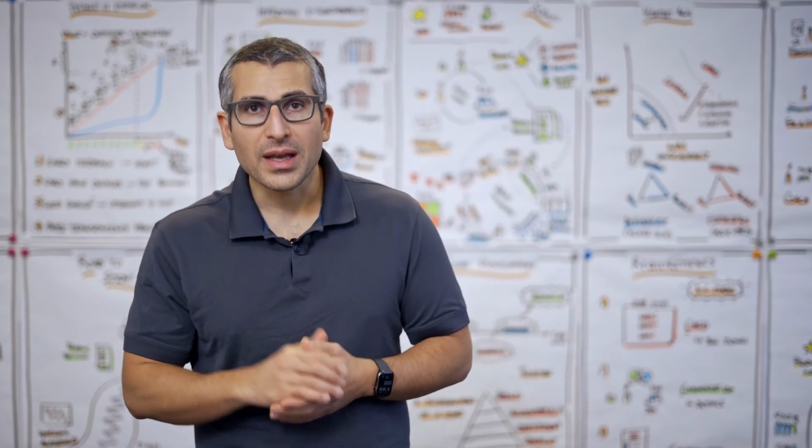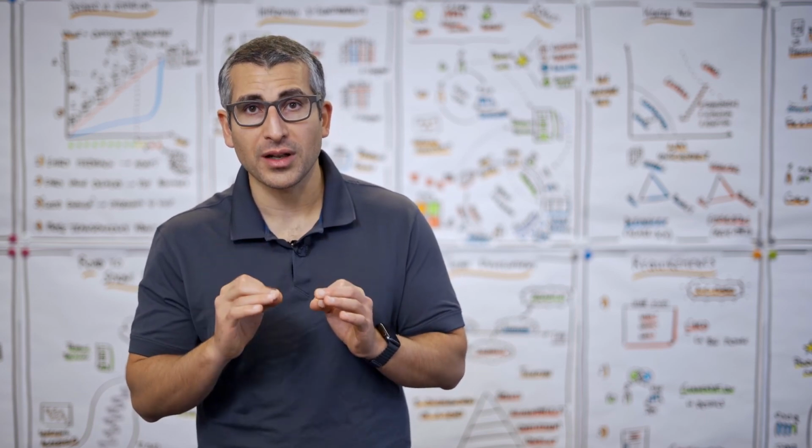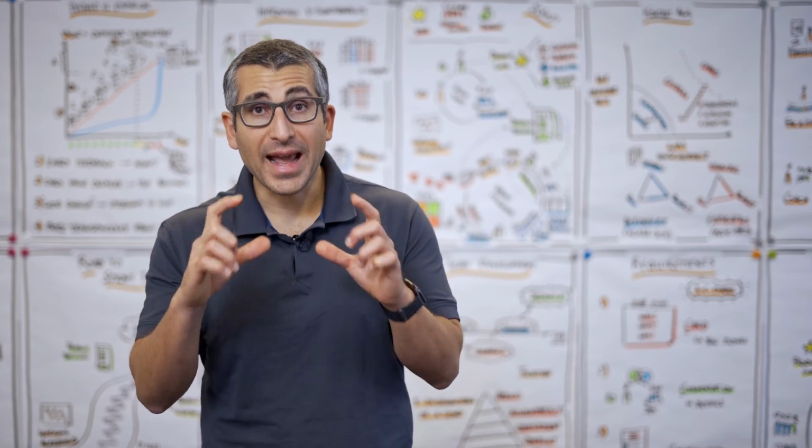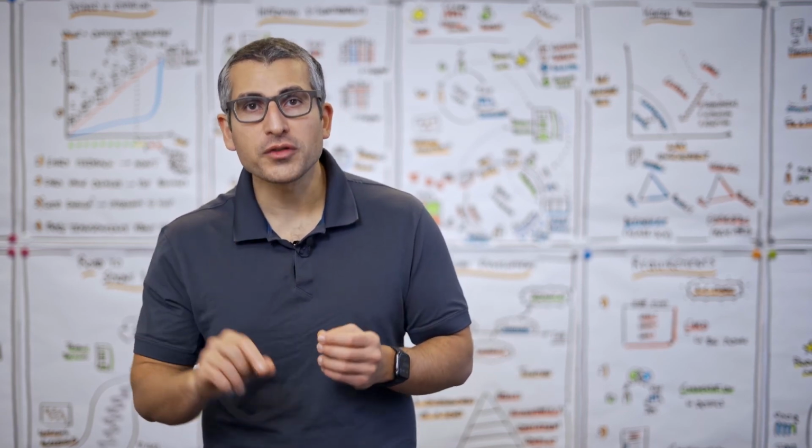Step number 4 is deciding what to do. What do we actually want to do differently in our next sprint? Those action items, I prefer to refer to them as Kaizens, move into our next sprint backlog. And last but not least, step number 5 is closing the retrospective. This is a great opportunity for a Scrum Master to A, summarize what we discussed, B, highlight what we are going to change in our next sprint, and C, collect feedback on how they conducted the retrospective.